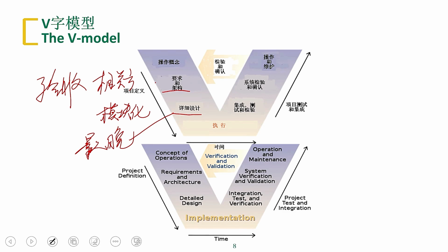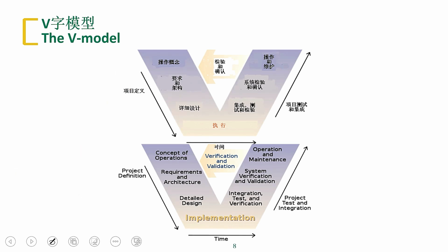These functions must be part of a whole architecture or a structured design and should be put in the early planning. If I have written code and you then add 3A, authentication, authorization, billing, including audit functions, embedding them afterwards is very difficult.